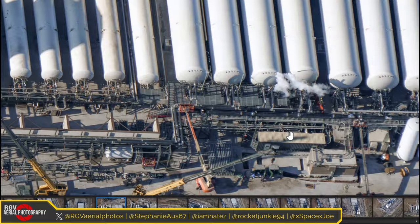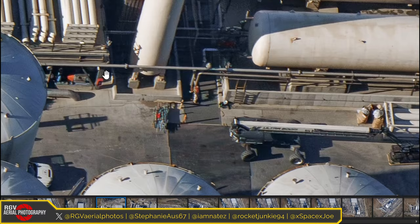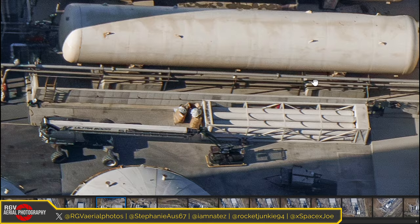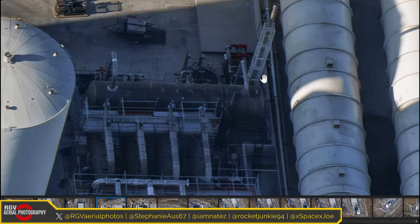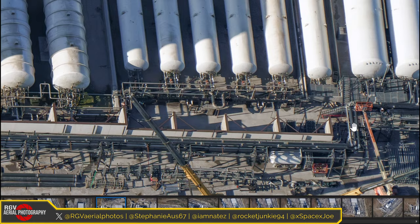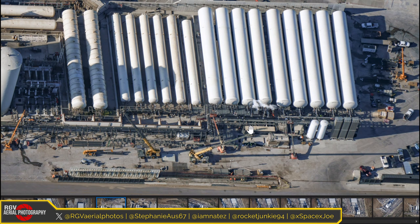And even in the interim, another thing that was pointed out to me is that to backfill the nitrogen and LOX tanks, they need a pressure system from the fluids bunker, which we follow this pipe, which is amazing. Like you just said, Nate, it's amazing how people can do this and work out where all these things go. That pipe in particular makes its way up and over and around and around and up and over and around and back over, and eventually comes back over to here. That is to backfill until, sorry, I'm moving around so fast, until I get all these vaporizers commissioned. That's how they're going to backfill the tanks with the gases. I guess that one's for nitrogen, and the LOX side will be backfilled with this system right here, I think is what they came up with.